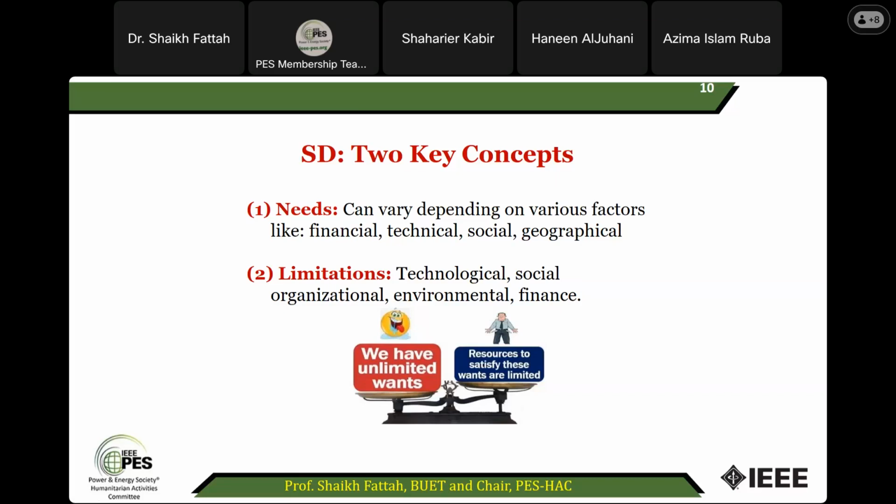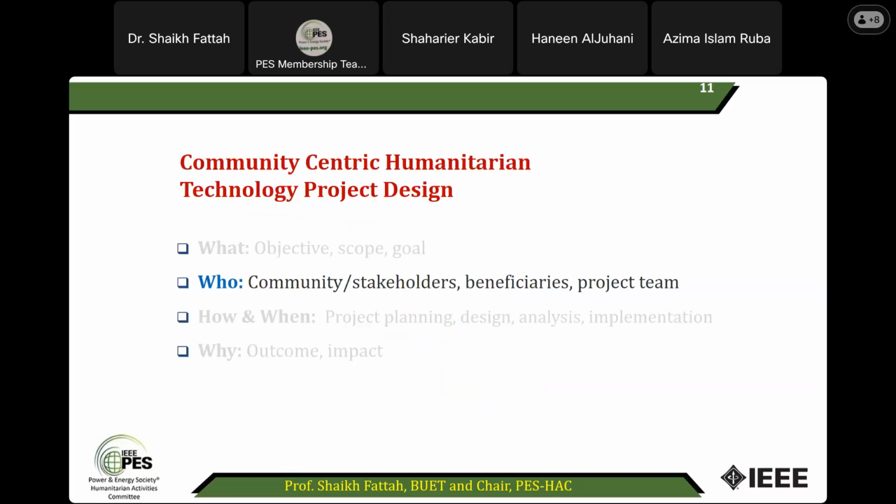So that's a balance, because you can study the needs, you can analyze, and find out the subset of needs. If you can have some measure of prioritization, you prioritize and find out a subset of needs which you can target. I hope you understand. This is called need analysis, and it is very important at the beginning of the project.